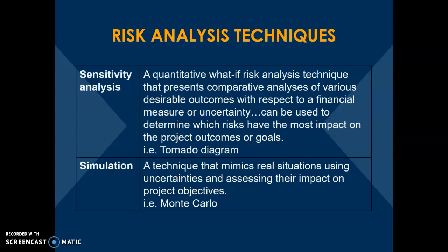And then there are various simulation techniques. The most well-known one is a Monte Carlo simulation, which uses random number-generating software, like Excel could be used to do a Monte Carlo simulation, to essentially test hundreds of thousands, or at least tens of thousands, of potential outcomes, and look at what the averages or statistical simulations suggest will be the outcome of a given situation. The results of a Monte Carlo simulation can also give you insight into whether or not a project is worth undertaking based on the risk of success or failure.